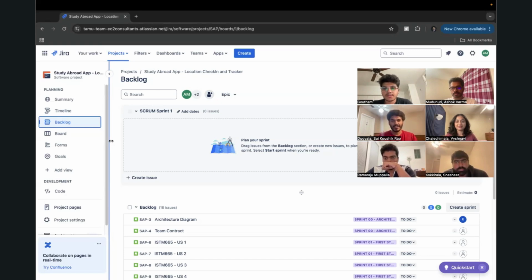Me and Shashir will work on the database. Our focus is on designing and implementing the database for check-ins. Our tasks include designing the DynamoDB schema for users, check-ins and statuses, implementing tables for securely storing check-in records, setting up IAM permissions to allow Lambda functions to interact with DynamoDB. We will first finalize the schema design and then move on to database setup. By the end of the sprint, we will ensure that the backend can read and write check-in data properly.